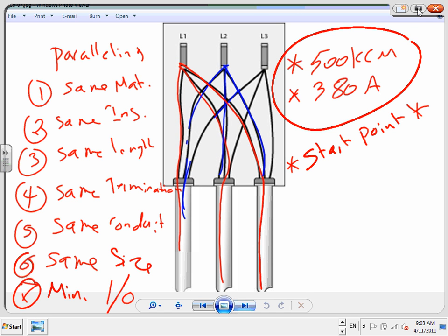When you install a 4,000 amp switch gear with large UPS system and PDUs and transfer switches, good companies go with higher. Okay, we design it, like Michelle Cooley will design it. Hunt Electric will install the system, or Egan will install the system, and then X company comes, the third company, guys, electrical company comes and does the commissioning. Commissioning, Mr. Beb, is detailed point-to-point operation manual testing.